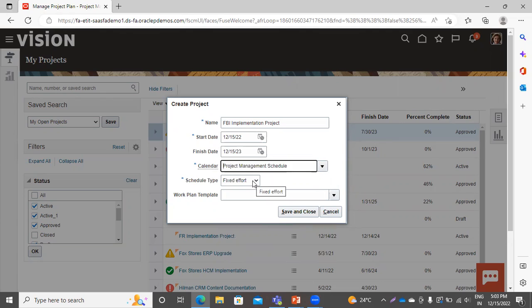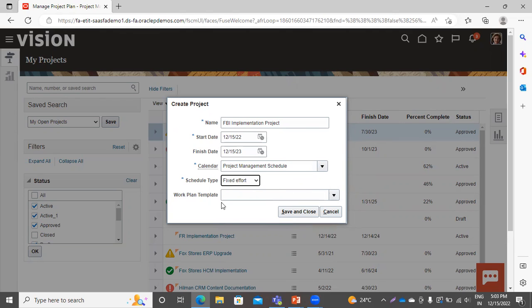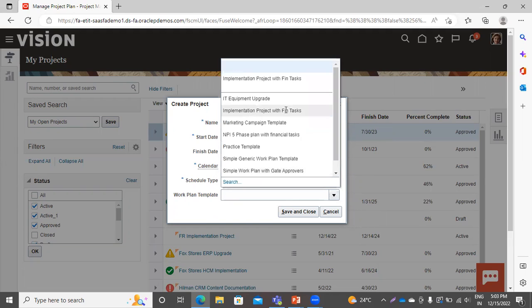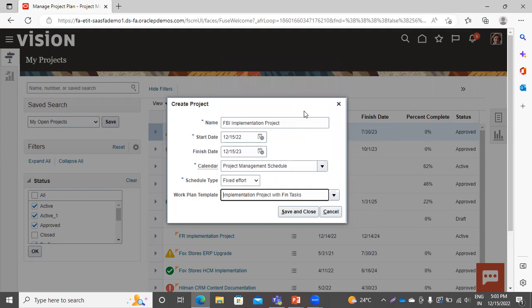The system asks for the schedule type — Fixed Duration or Fixed Effort. I am selecting Fixed Effort. Now you have to select the work plan template. This is not a mandatory field, so you can skip it, but selecting one will help you in defining the tasks. The Implementation Project with Fin Task is predefined and provided by Oracle. Now click on Save and Close.